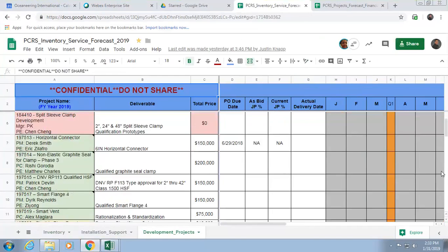You're going to split the budget into WBS. You're going to spread it based on what we think we're going to be using. Sometimes it's a guess, sometimes it's a hard number, but you have to do best effort guesstimate to make sure that you kind of split it out, not just keep everything in one place. So that we know, as a business, at what point we're going to be spending the money across the time. We'll come back to this.